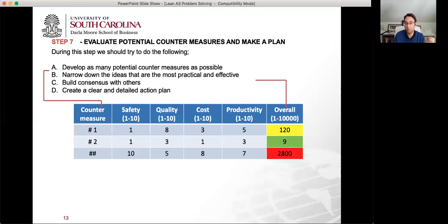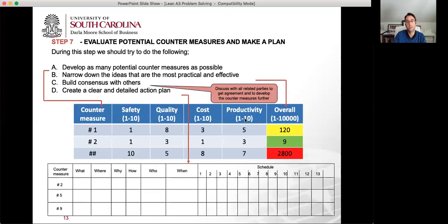You can sum the numbers. You can have yes or no in the numbers, right? So this is one I created with only 4 categories. It is 1 to 10. You multiply them and you get the overall. So it's 1 to 10, 4 categories. You're going to get to 10,000, right? And then you use the stoplight to say which ones you consider to be more important and which ones are less important, right?